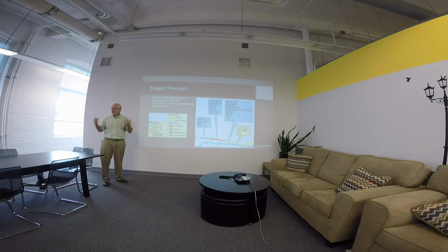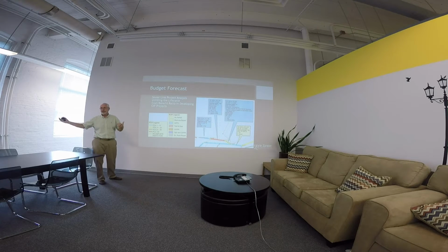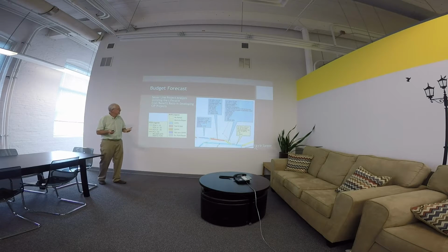Initially this would be done on the capital improvement for a replacement sewer line. Now they did a cost benefit ratio and found that by doing the rehabilitation and focusing on exactly what was failing, it gave them the best life cycle cost, and now they can project that the system's good for another 30 years. If they replace the pipe, it would be another 80 years. So they look at that cost compared to the cost that they actually need. That's your life cycle cost benefit ratio.